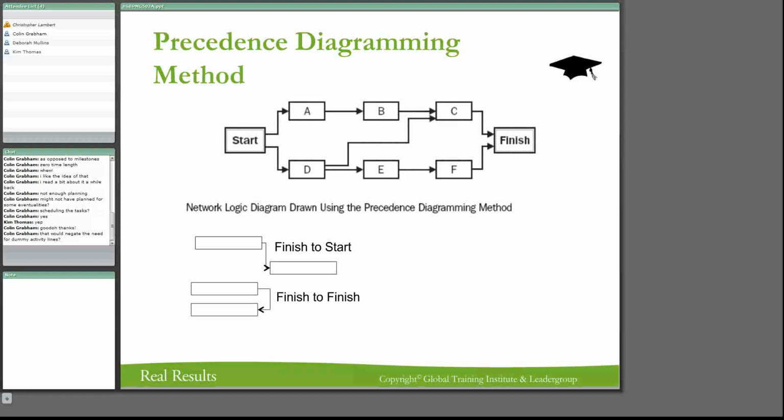So that way, when we're looking at precedence diagramming, there's a finish to finish. In other words, the diagram has to finish at the same time that the other one does. So that you've got two activities, both of them should finish at the same time. That's called a finish to finish. Right? There is another one, there's actually 4 of them.